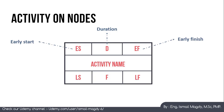EF (Early Finish) is the earliest possible time for the activity to finish, and it equals Early Start plus Duration. In the bottom-left corner is LS (Late Start), the latest time the activity can start without affecting the overall schedule. For critical activities, LS equals ES; for non-critical activities, LS equals ES plus float.